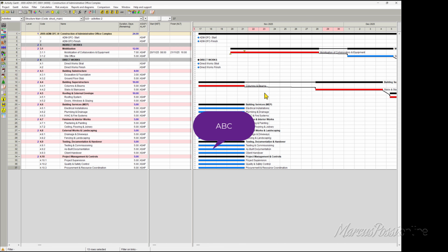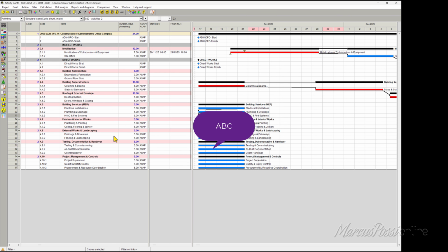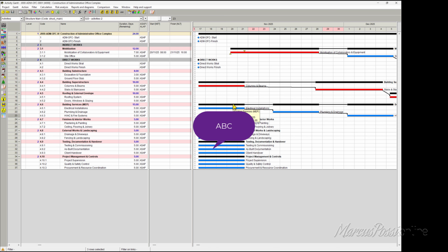Recalculating, okay, no links. If I decide to click on line 21, shift, line 23, right click, link as a chain. Okay, calculate. Link as a chain. There is the second way of linking things without moving spiders, moving mouses and dropping graphic elements. Another thing that you may use.